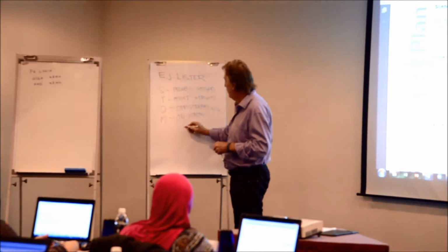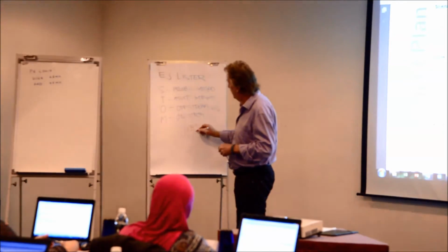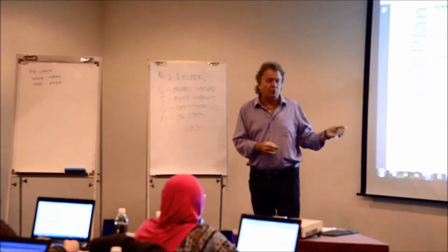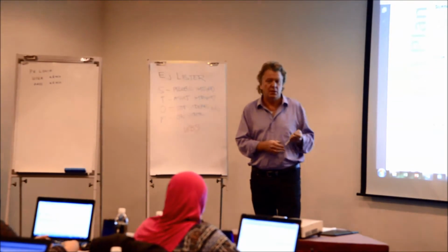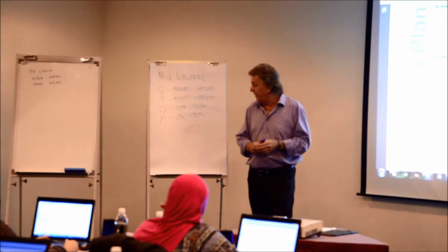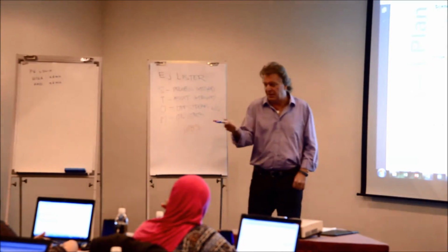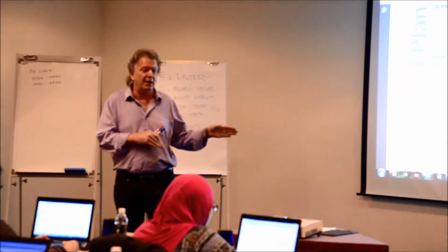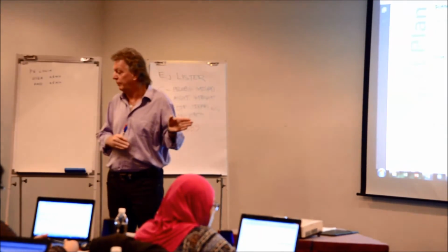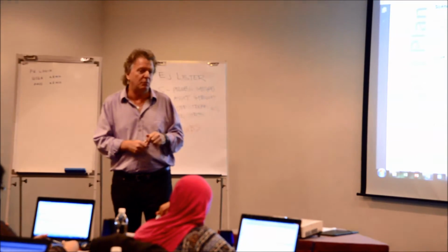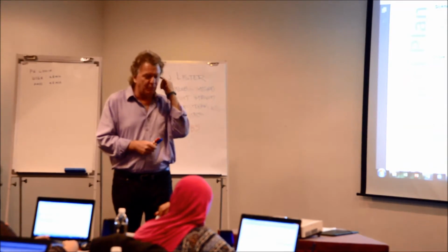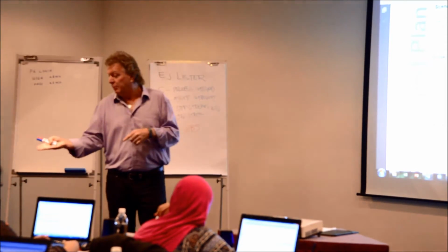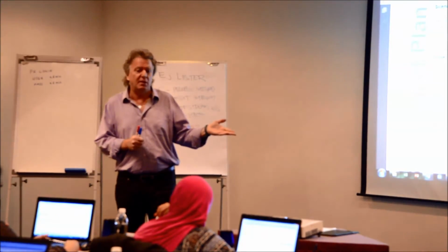So all of this is going to relate to one important thing that we're going to work on this morning. It's called WBS. This is the work breakdown structure we're going to build in our Primavera project. And one of the things that we want to try to do in this technology is have the ability to transfer data and information between different applications. So if we're running on an SAP platform or Maximizer or Maximo, JD Edwards platform, we want to communicate between Primavera and our work order management system, for example.